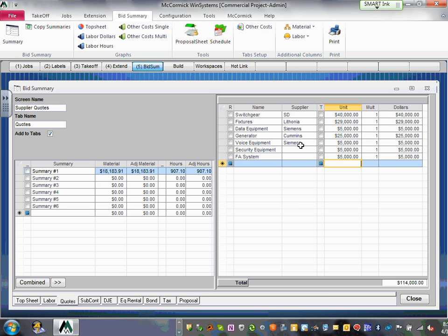I want you guys to fill in the information, the codes here. You find it, you're smarter than me. Okay, so that's basically it. You fill in this information. These are our quotations for this project. That's the fire alarm panel and the fire alarm annunciator. You still have to take off the devices, remember. These are the panels, the gear. Security panel. These are the voice equipment, hubs, and what's not. These are all coated material. Remember, you still have to take off the devices and the wires.